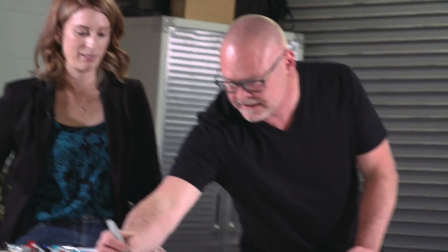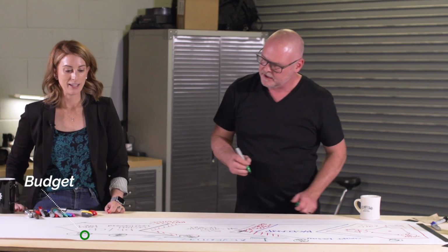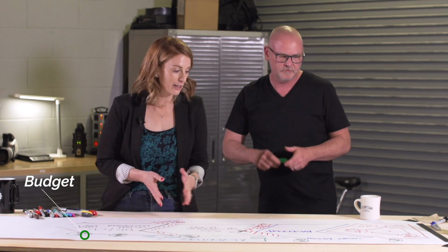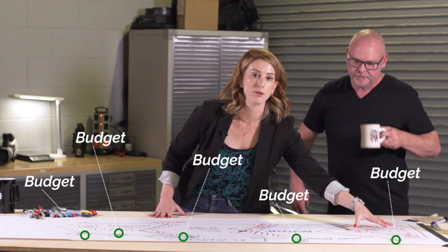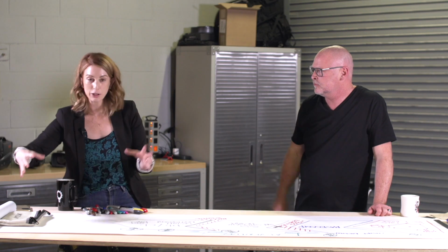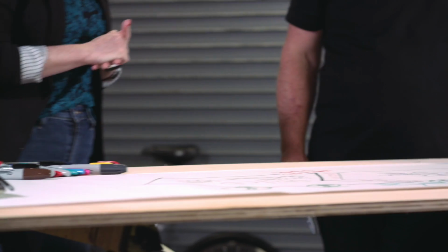This is the design build process. And then another one right here. Yep, as you're starting to see the trend here, everything we're doing, we're going back and running it through the lens of what we determined up here when we did the feasibility. What can happen in a bid build project is you're not finding any of this out until you're off the paper over here somewhere else. And by that time, if you need to make a correction or tune something up, you've got to come really far backwards to make the correction, rather than taking these intermediate steps that make it really easy to tune something up if it needs to be.